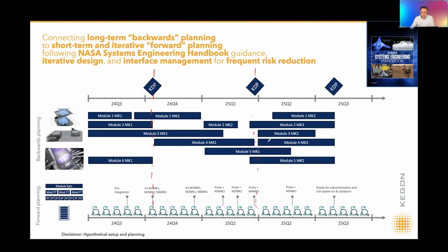So the milestones, they stay. Agile or not, the milestones stay, because we use milestones to synchronize the entire company with each other, but also with external suppliers. And as a matter of fact, if you have a marketing department who has already mentioned to the market that a certain product will be released at a certain moment, that's quite a hard milestone as well. So you merge those two planning approaches on top of each other.